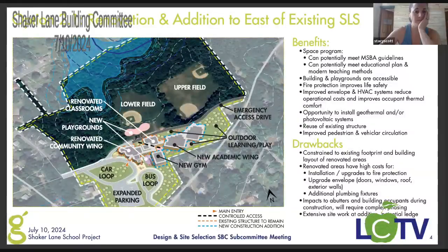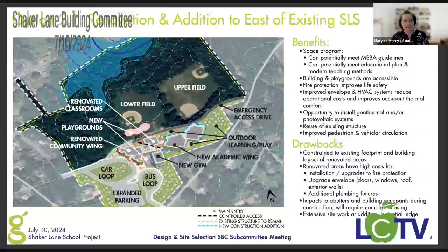One positive thing about putting the addition here in this location is that it allows the existing septic system to not be disturbed during construction. And it also keeps the two fields available for community use. And then that new playground area, that sort of pink lumpish area, that would be installed on the slope that goes down to the lower field.